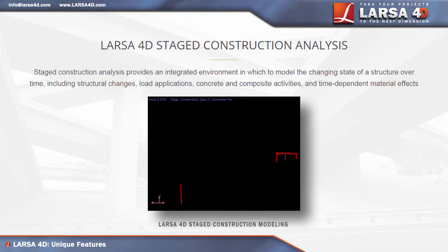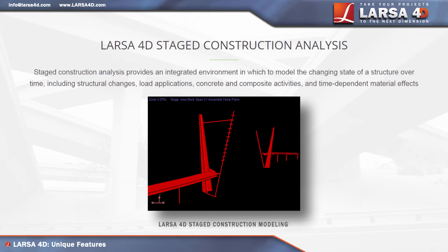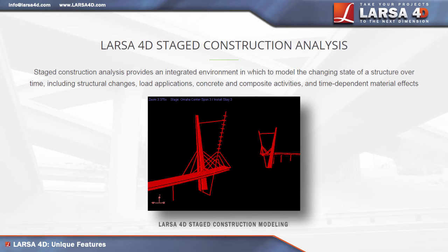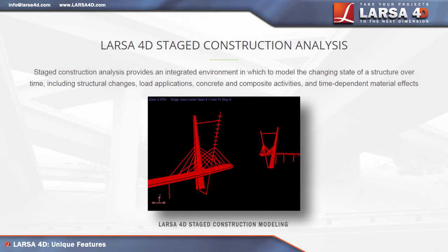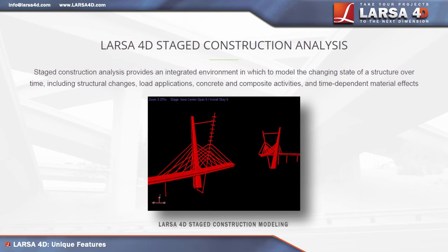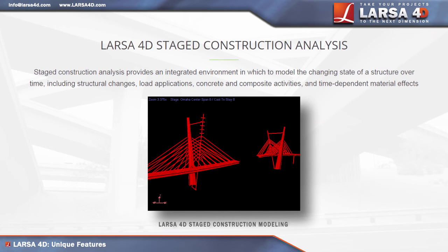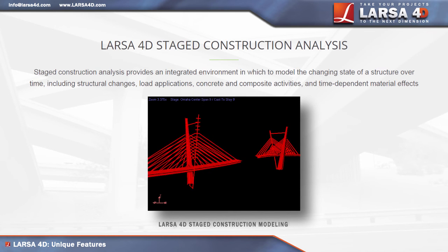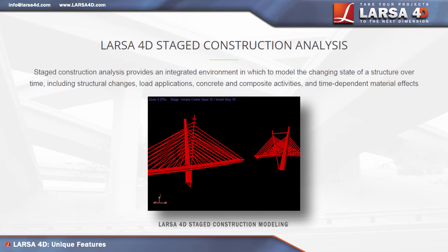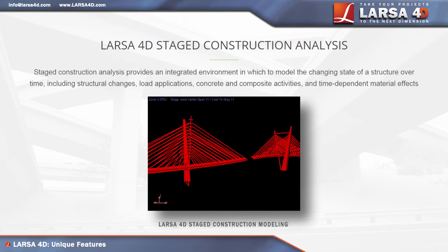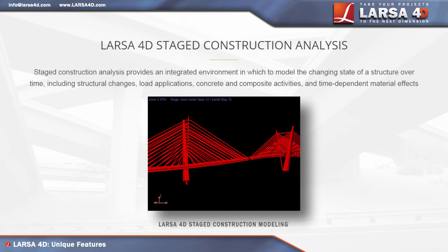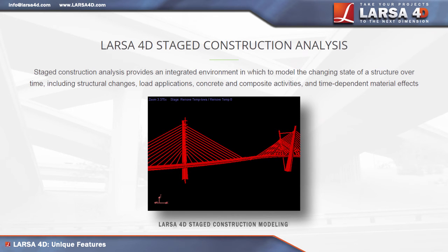With full construction activities included for the construction and deconstruction of members, plates, springs, and foundations in addition to loading, support, constraint edges, displacement initialization, and hoist for incremental launching, LARSA accurately models the construction sequence for the project in discrete stages and steps, so that the cumulative effect of each load class can be reported separately for code-based load combinations. Each construction activity is associated with a load class, such as self-weight, dead load, live load, or pre-stress.